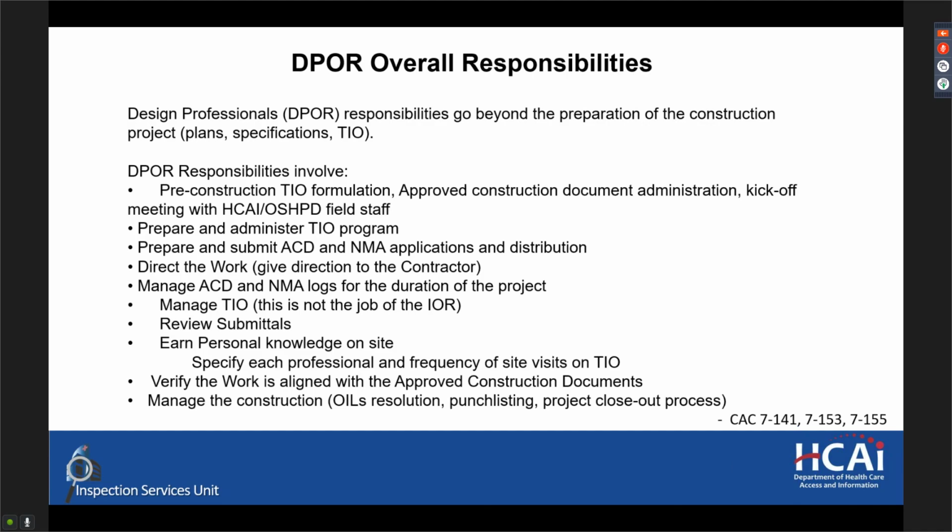The DPOR shall also manage the TIO. This is not the job of the IOR. We've noticed that the IORs have taken a lot of responsibility over the TIO in the last couple of years, or maybe even since before that. And while they are the ones who are performing the tests and inspections as prescribed by the TIO, an IOR is not responsible for holding the TIO and managing changes to the TIO as a result of the project. That is the job of the architect or engineer in responsible charge.